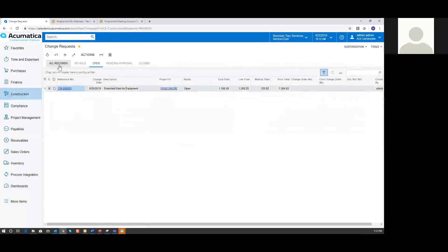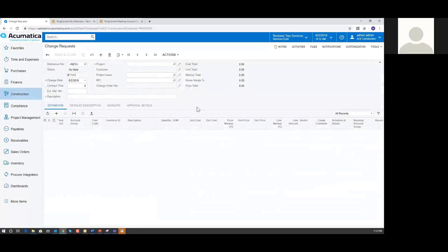In Acumatica, when I create a change request, this is the screen where I'm going to create that change. If I want to create a brand new change request, I can just click on that plus sign. It's going to automatically pull up the change request, and now I've got to fill out all the pertinent information — what project this change request is associated with, and whether it's associated with a project issue or an RFI. These two items are part of the project management functionality within the Acumatica Construction Edition, so we can link a project issue or an RFI directly to a change request.